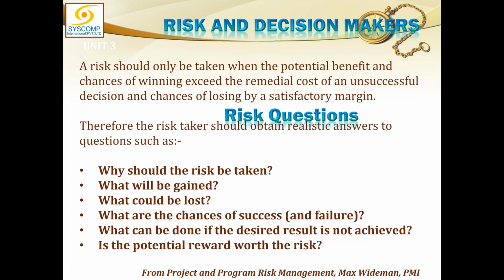A risk should only be taken when the potential benefit and chances of winning exceed the remedial cost of unsuccessful decision and chances of losing by a satisfactory margin. So this is a very, very important dialogue. Let us debate on that. Let us discuss on that.